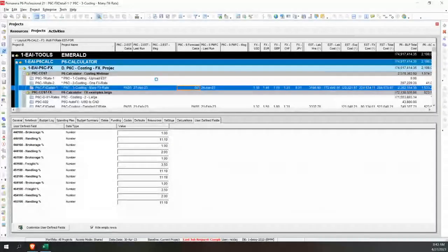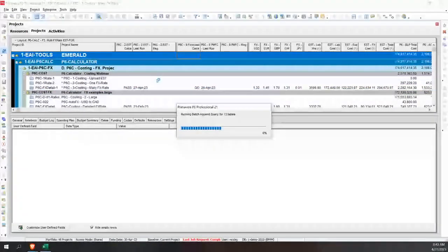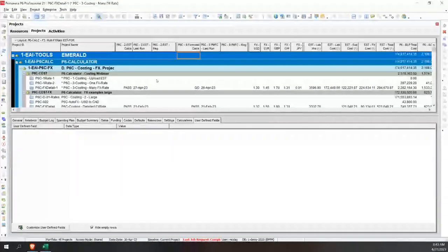If you're in an integrated environment, you might get an integration to run every day. You might get it to run every week. You might get it to run once a month, completely depending on your particulars. The more often, the better. One of the things with this sort of tool is it helps you update more often, and more often is better. So you really want to challenge yourself to move away from once a month, because once a month you could be using kind of stale data. So you want to drive your team to be able to update more often.